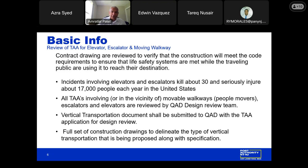Vertical transportation documents shall be submitted to QAD with the TAA application for design review. A full set of construction drawings to delineate the type of vertical transportation that is being proposed, along with specifications. Next slide,